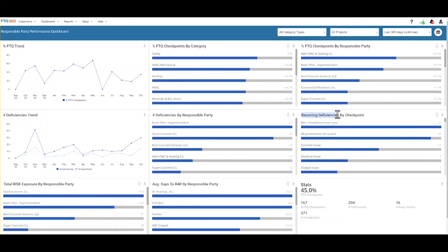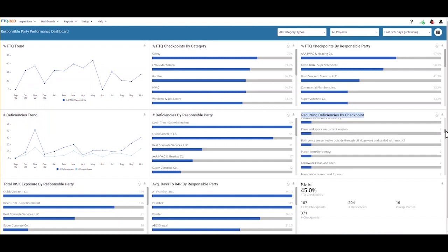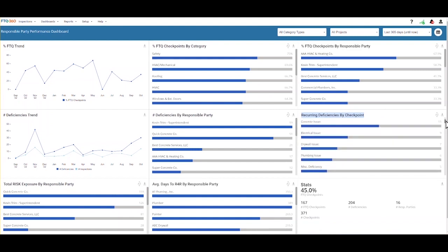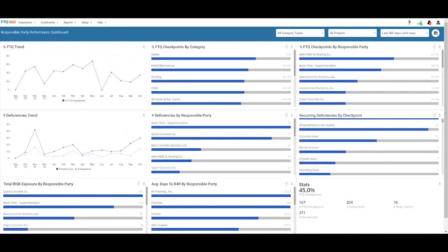At their next quarterly meeting, they review the next top 3 to 5 recurring issues and repeat the continuous improvement process all over again. They're on track to eliminate 12 of the worst recurring issues that accounted for 1/3 of their preventable problems from their construction process by the end of the year. But they aren't stopping there.